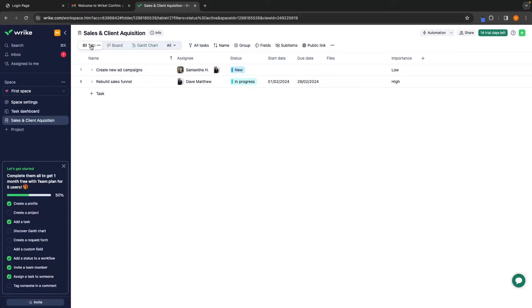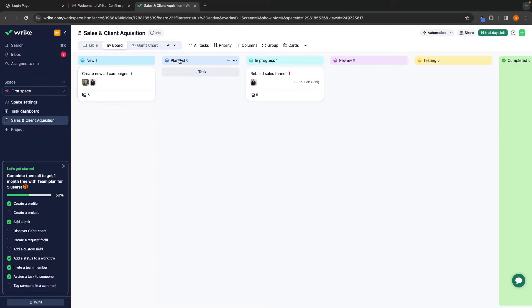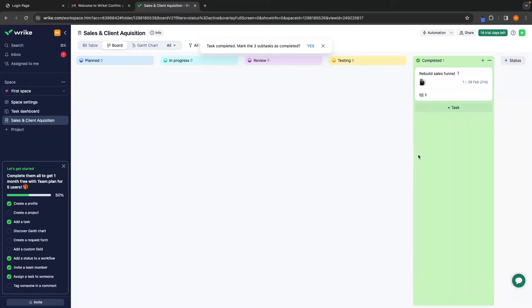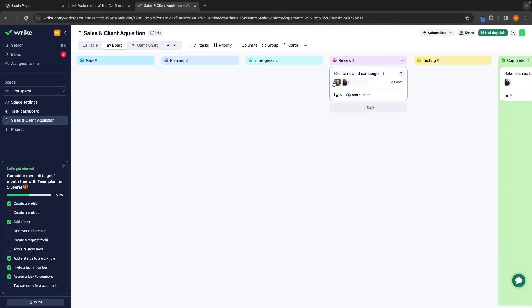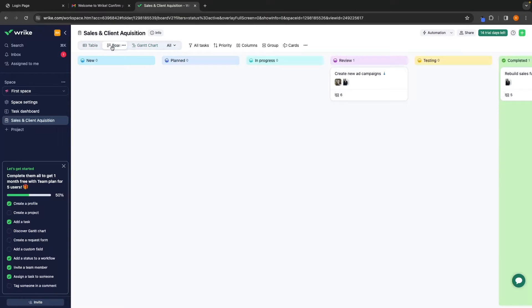We can also change the view. Right now we are in Table. Let's go ahead and switch this to Board — we now have a Kanban view, which shows us all the statuses and where each task is in relation to status. So with Dave, let's say he has finished rebuilding the sales funnel — he can go to the board and move this to Completed. Then Samantha can come along and move her tasks through all of the different sections to show the entire team where everything is. This is just a different view, and we can go back to Table to update status manually. It can be super helpful especially when you have 50 to 100 tasks, just to see the progress of everything at a glance.